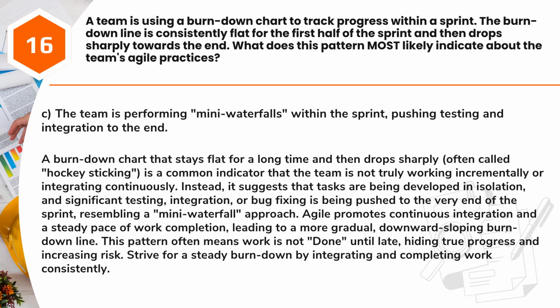Agile promotes continuous integration and a steady pace of work completion, leading to a more gradual, downward-sloping burn-down line. This pattern often means work is not done until late, hiding true progress and increasing risk. Strive for a steady burn-down by integrating and completing work consistently.